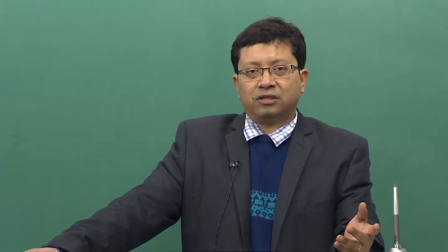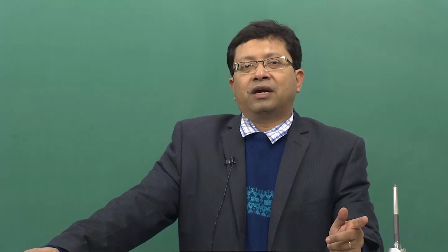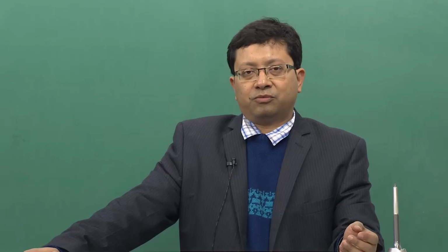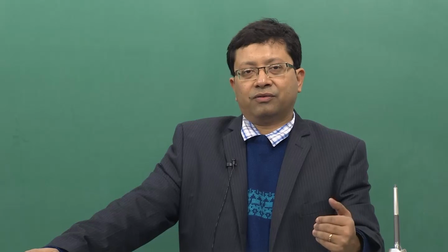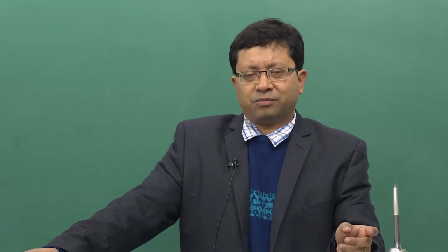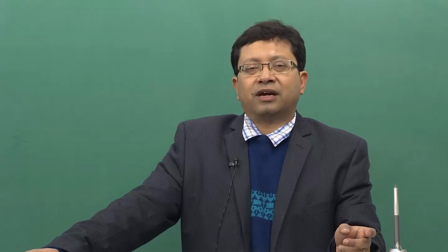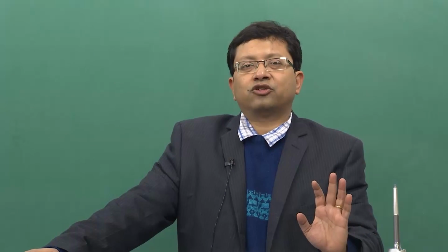So, if you remember, in the last slide we discussed the W function and how, in the series and the parallel concept, they can be either added or multiplied depending on what concept you are trying to follow. And the W function was basically probability into e to the power the functional value of time. It is basically something to do with the generating function. If some people are aware of the concept of generating function, moment generating, characteristic functions from the point of view of probability, that is not very important, but I just thought I will mention that.